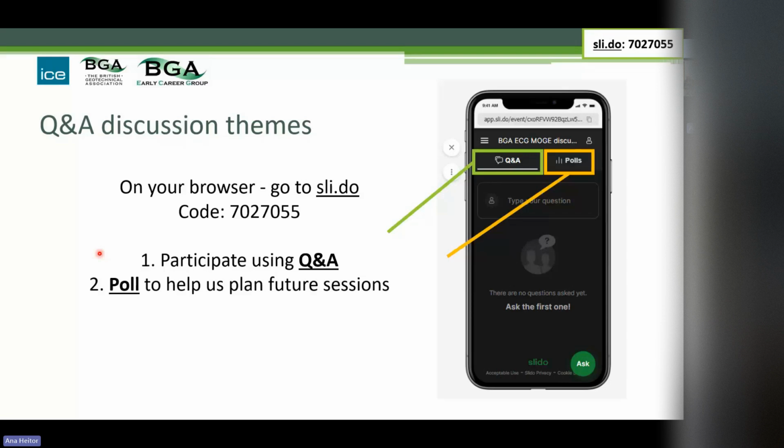And the key element is the speed, because the really key part about this is that you need to get all the readily available information before you commit and plan an intrusive investigation. Walkover surveys, obviously, in non-urban areas are pretty important too.